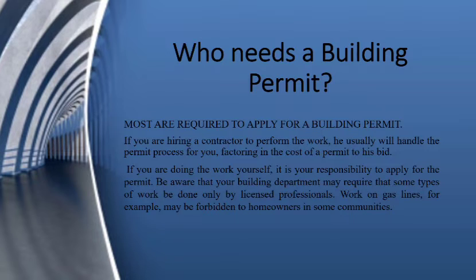If you are hiring a contractor to perform the work, he usually will handle the permit process for you, factoring in the costs of the permit to his bid. If you are doing the work yourself, it is your responsibility to apply for the permit. Be aware that your building department may require that some types of work be done only by licensed professionals. Work on gas lines, for example, may be forbidden to homeowners in some communities.